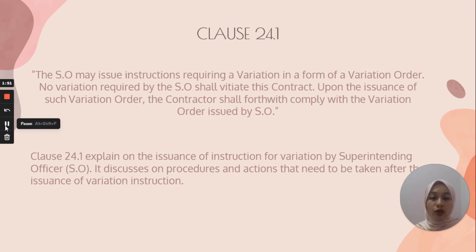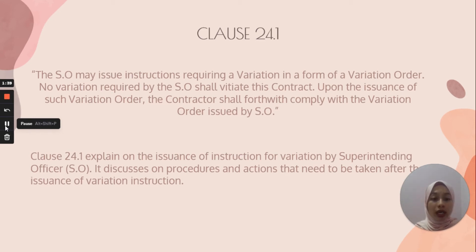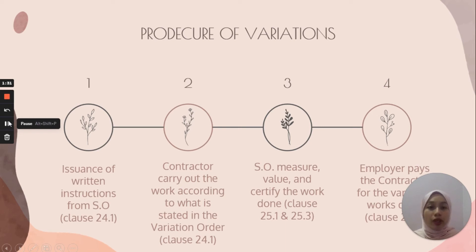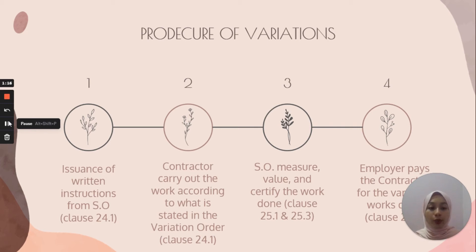Next is Clause 24.1. This clause explains the issuance of the instruction for variation by the Superintending Officer (SO), and discusses the procedures and actions that need to be taken after issuance of the variation instruction. Here are the procedures of variation: First, issuance of written instruction from the SO. Second, the contractor carries out work according to what is stated in the variation works. Third, the SO measures, values and certifies the work done. Fourth, the employer pays the contractor for the variation works done.